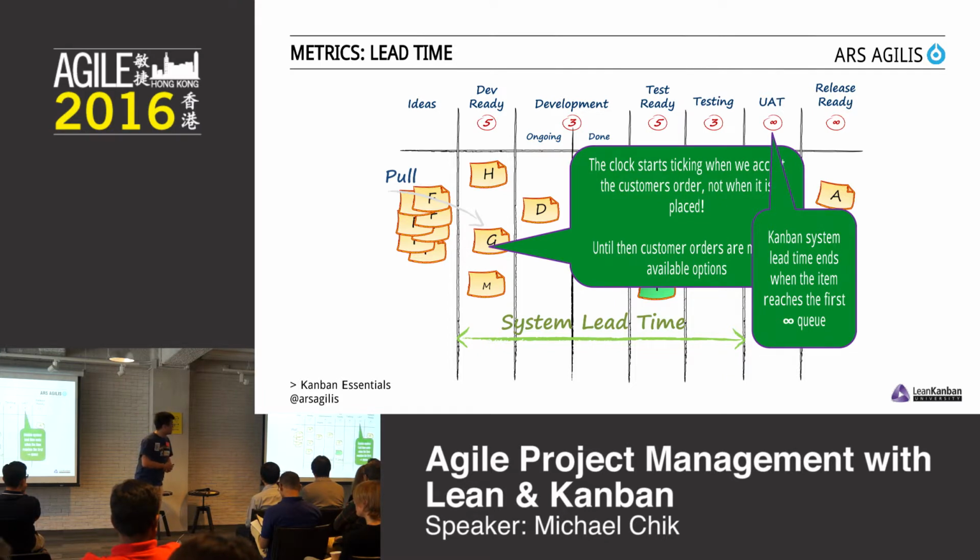Then there's another one. We just call that customer lead time or overall lead time. Which would be usually from the first commitment point until it's released. So how long does it take me as a company to get stuff to the customer? Sometimes it's not even commitment. Sometimes we measure it from idea inception. So the first time someone thinks about this idea, that's when the clock starts ticking, because it measures the organizational capability to deliver something to your customer.